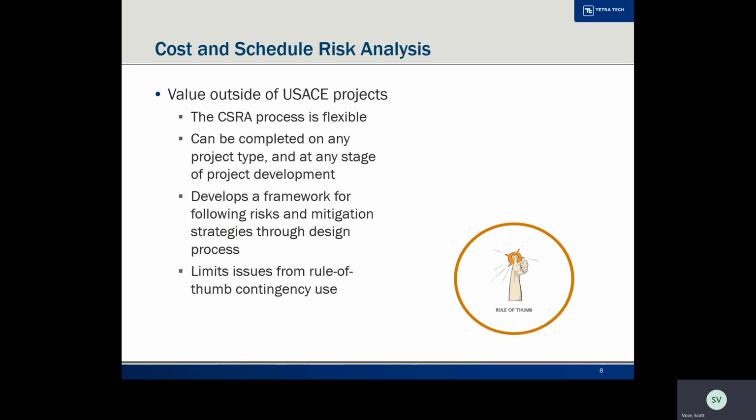And lastly, it removes those rule of thumb contingencies. As noted previously, a contingency developed through a CSRA process is project specific. So the estimated contingencies will vary from project to project, but hopefully they will better account for actual contingency needs.